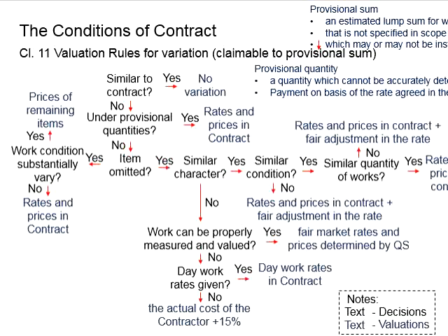So if that particular work has already been made known to the contractor, but is not detailed out within the contract, should the work be instructed, the contractor will be entitled to claim for the variations, and the relevant expenses will come from this provisional sum.